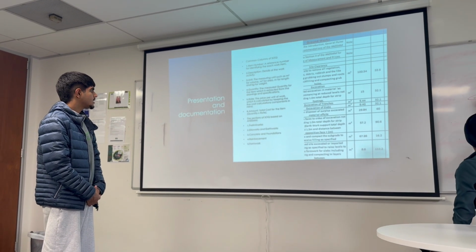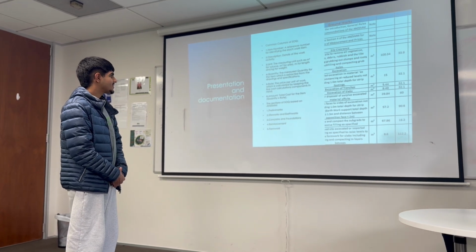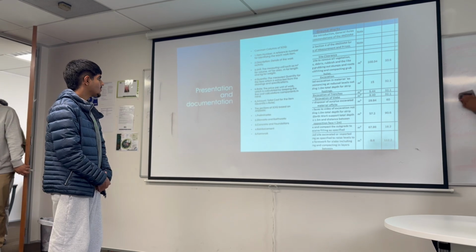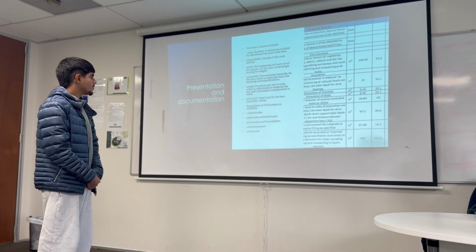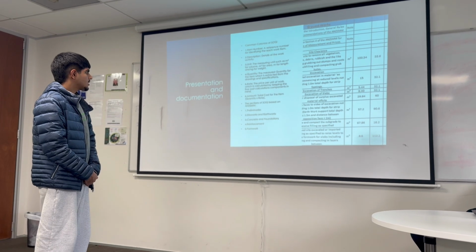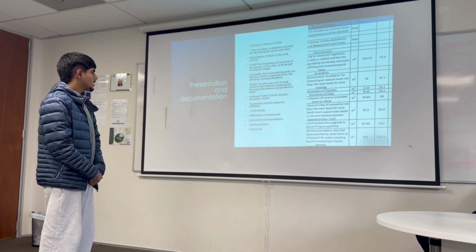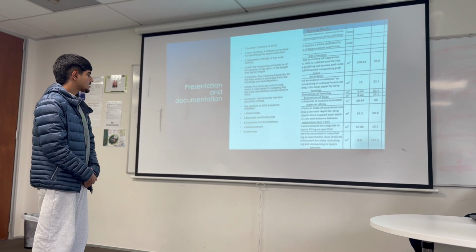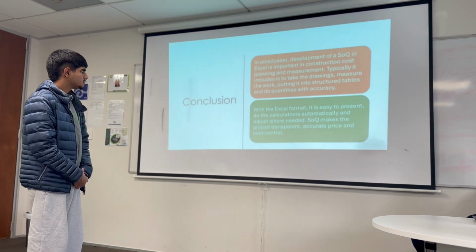Rate, the price per unit of work which is calculated by keeping the final calculation components in mind. Amount, total cost of the item, quantity times rate. The sections of SOQ are based on the ANZSM, like preliminaries, earthworks, concrete and foundations, reinforcement, and foundation.